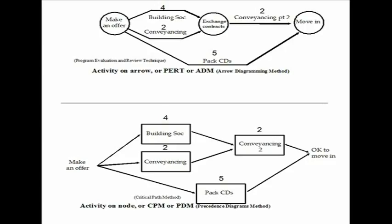The real difference is that PERT is concerned with events, whereas CPM is concerned with activities. So with PERT, you have events drawn as circles, and they are connected by arrows. The arrows are the activities — the arrows are what take the time, a bit like driving between cities. Whereas with CPM, it's about the activities, so you put the times on the boxes, not on the arrows.